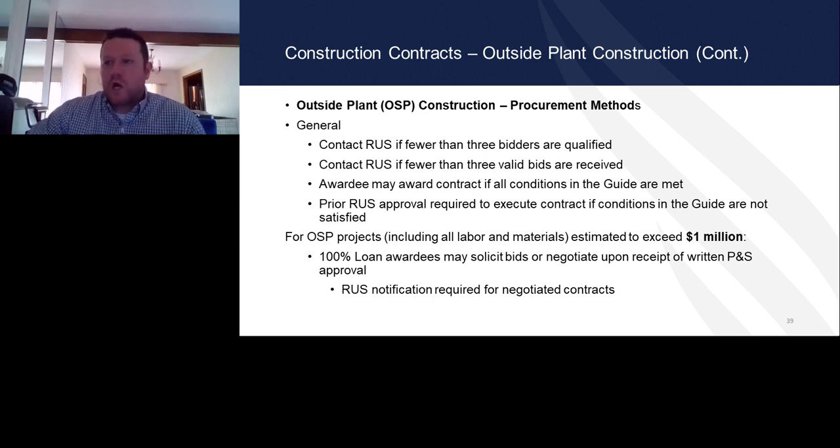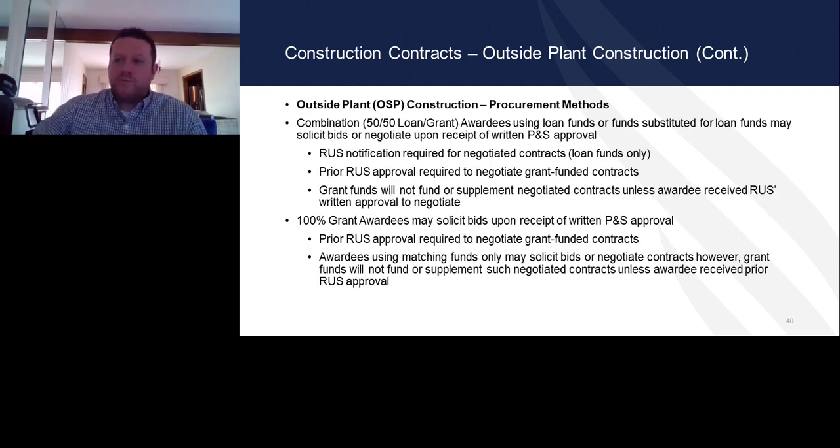There are several caveats when you're talking about the contracts that are executed. RUS does have the ability to deny contracts based upon affiliates if you didn't go through the appropriate affiliate process. Price, risk, and contract modifications could result in a denial. As George said earlier, non-RUS contracts need to be approved prior to execution. The bottom of page 17 of the contract guide also discusses contract documents in further detail.